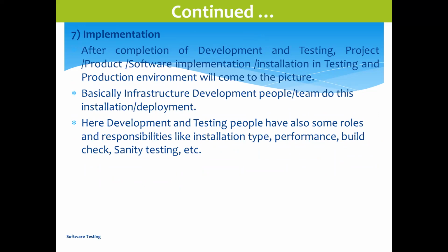Just don't go to the last day. If you are executing for 10 days, then you can try to complete it in 6 or 7 days only. In that way you can prepare. Keep some time buffer. Maybe a health issue will come, or somebody is going on urgent leave, or something can happen, or the network is down, or the server crashed. Anything can happen. So always keep a buffer of 2 or 3 days, and you can plan accordingly.